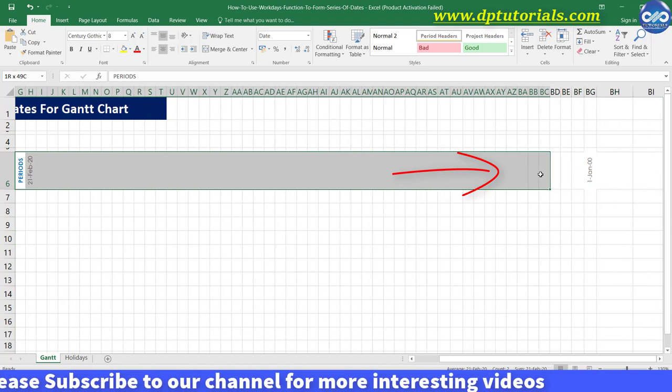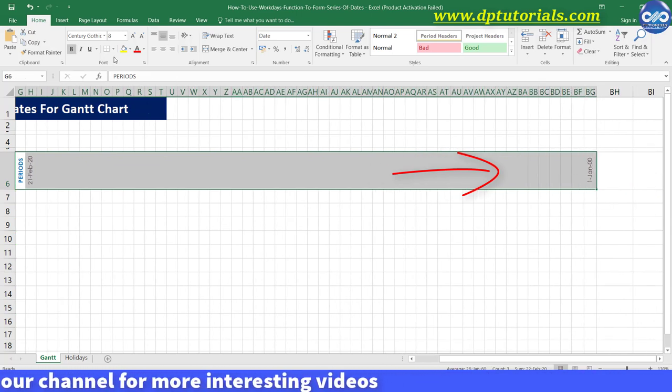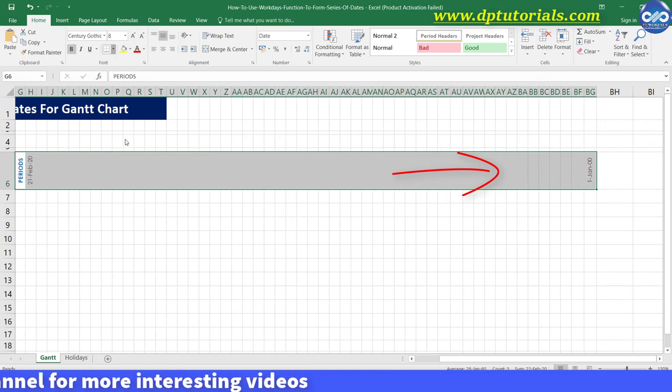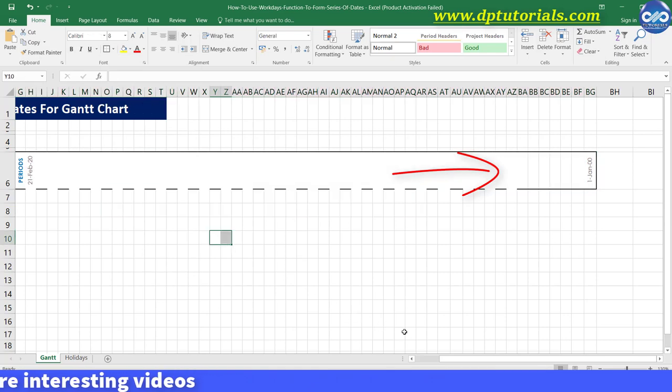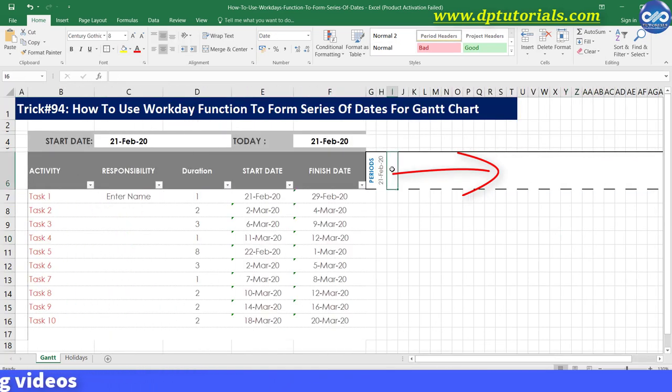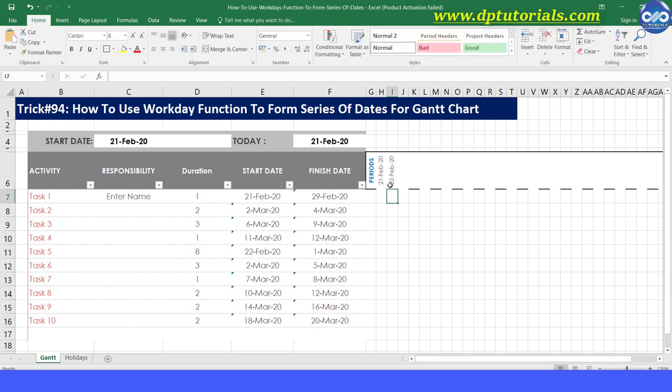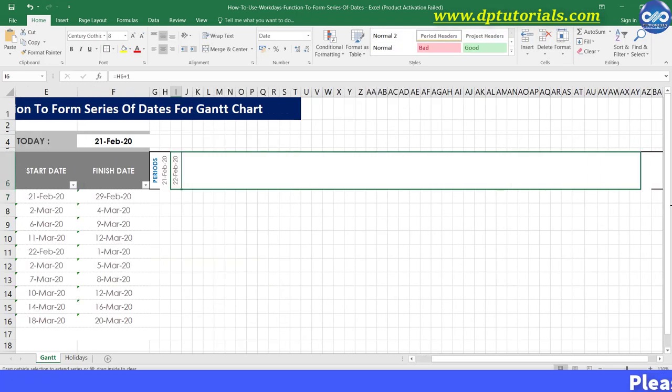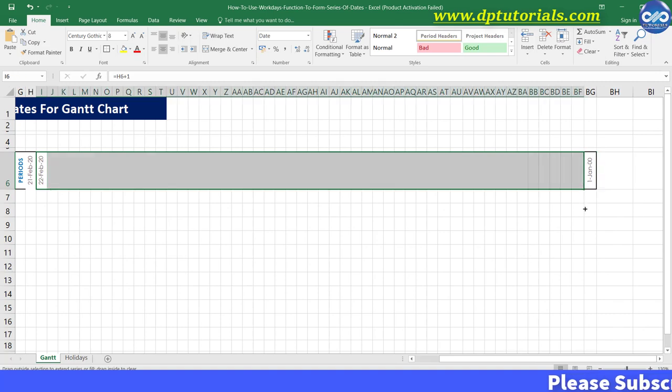Normally everyone of us would put dates by just entering a simple formula in cell I6 as equals to H6 plus 1 and then drag the formula till the last column to apply the same formula. So this is the easiest way to put the timeline.